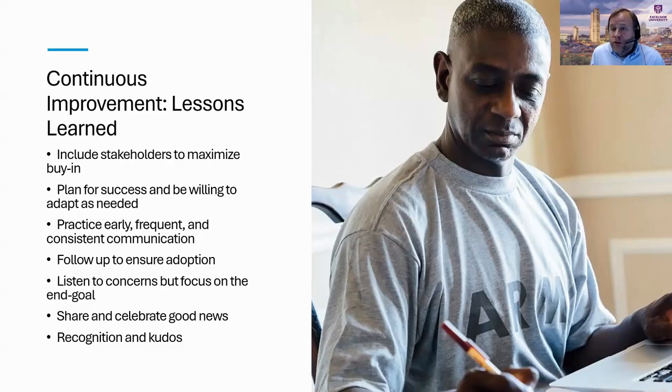I think we did a very good job internally with our staff and our full-time faculty of really socializing these documents in advance. We had a lot of chance for question and answer, feedback and revision. Because we were moving so fast, we had fewer opportunities for our part-time faculty in the first term we rolled it out to really become comfortable with the document and the ideas. And so there was definitely some nervousness at first. There was some concern about workload. And I think it took some time to get people on board, and sharing those positive stories is part of what really achieved that in the end for us. So, given a longer time frame, it would have been good to do a little more when we have meetings with faculty, to share these with them, get their feedback, and talk through their concerns earlier.